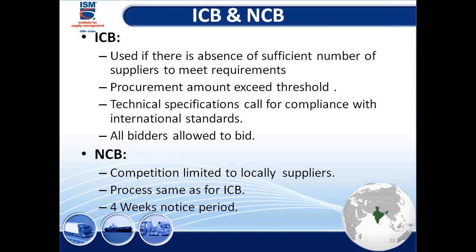Now, I've already given you a flavor of those terms, but let me walk through this. ICB. When you feel there is not a sufficient number of supply sources in my country, absence of a sufficient number of suppliers, or the threshold is very high. Now, thresholds will vary quite a lot. I can see from the list of participants, they are from different backgrounds. If they are from the Government of India, from UN agencies, from the World Bank, or from international agencies, each one has different thresholds.